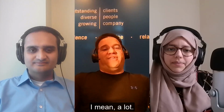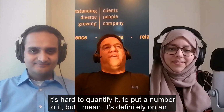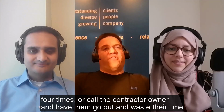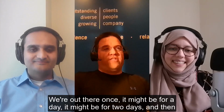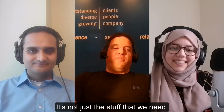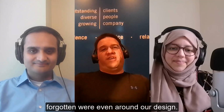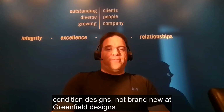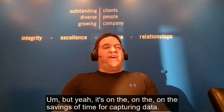I mean, a lot. It's hard to quantify, to put a number to it, but on an average project, we might have to go out on site to take measurements 3 to 4 times, or call the contractor or owner and have them go out and waste their time multiple times. Usually with a scan, it's one and done. We're out there once, it might be for a day, it might be for 2 days, and then we're done. We have everything. And it's not just the stuff that we need, it's the stuff that we didn't know that we needed, or things that we might have forgotten were even around our design. Again, these are used primarily in retrofit and existing condition designs, not brand new greenfield designs. But yeah, on the savings of time for capturing data, it's huge.